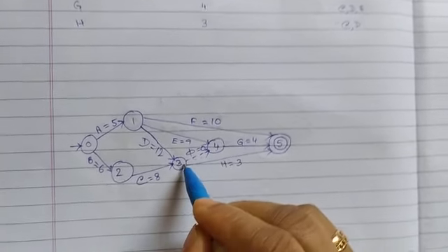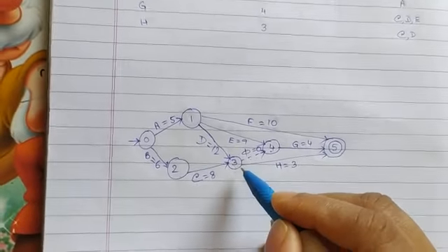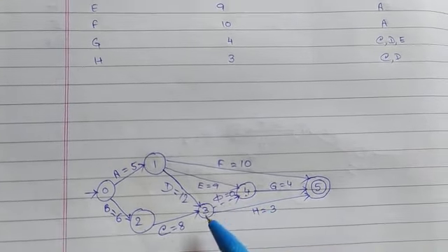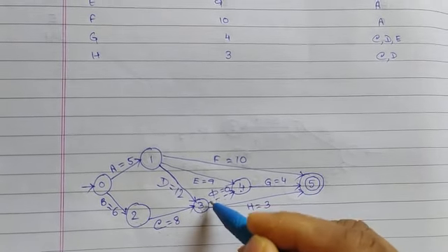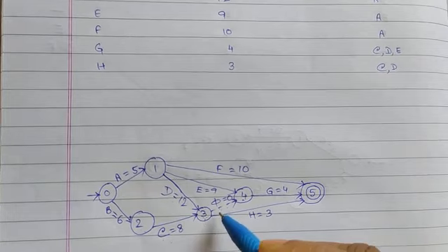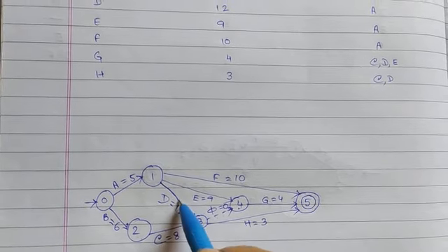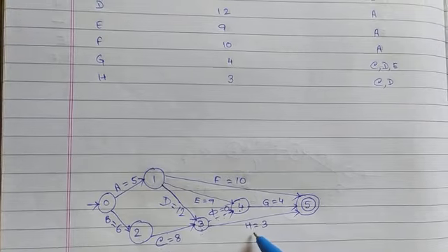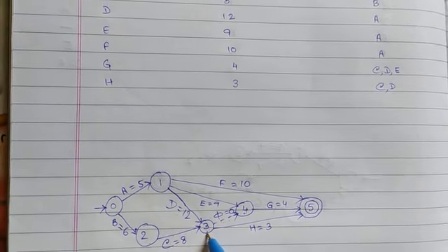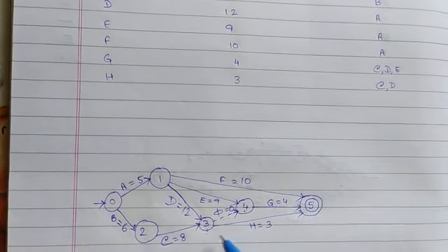Look, we have provided the arrow from 3 to 4 because if we provide state 4 as the starting state and state 3 as the end state, that means if the arrow was provided on this side, any task which will execute from state 3 will have its preceders as C, D and E, but H is the task whose preceders are only C and D. That means H must execute from state 3 and will meet the end state, as H is none's preceder. This is clear.